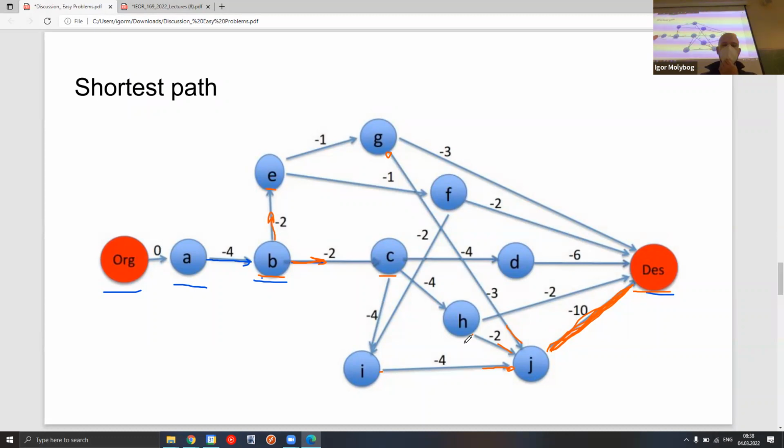And so we are asked about one of our clones that will have to make this longest path from one end to the other. When we are cloning ourselves in node B, there is one clone that goes this way, and then being cloned in node C, there is one clone that goes this way, and being cloned in node E, and one of these clones will eventually take the longest path from S to T, and this clone is going to be the one that is completing the entire job. Therefore, we are interested in finding the longest path from S to T.